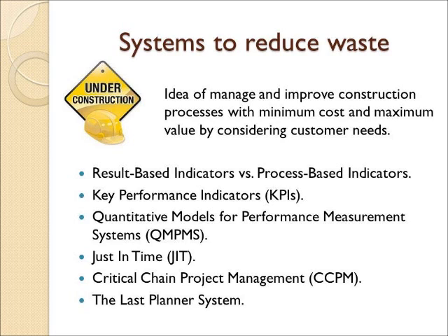Just-in-time (JIT) is a method of pulling work forward from one process to the next, just in time when the successor process needs it, ultimately improving throughput. Critical Chain Project Management (CCPM) is a method of planning and managing projects that puts the main emphasis on the resources required to execute project tasks. The Last Planner System (LPS) is a system that can increase the reliability of planning, improve production performance, and create a predictable workflow.